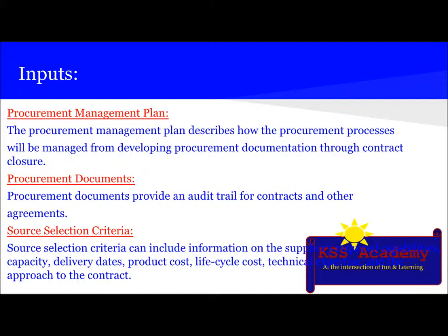Then there is source selection criteria that can include information on the supplier's required capabilities, capacity, delivery dates, product cost, life cycle cost, technical expertise, and the approach to the contract.